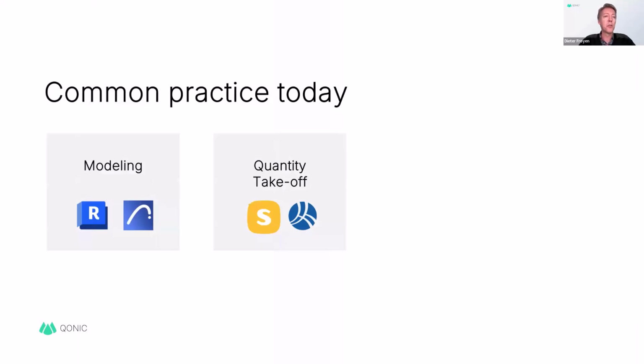What is a common practice today? On the one side, we have the modeling tools, the authoring tools to create a BIM model. They're mainly used by BIM modelers, and it's possible to read out some quantities within that software tool. You can create a schedule with the quantities or export them as a schedule useful in spreadsheets.